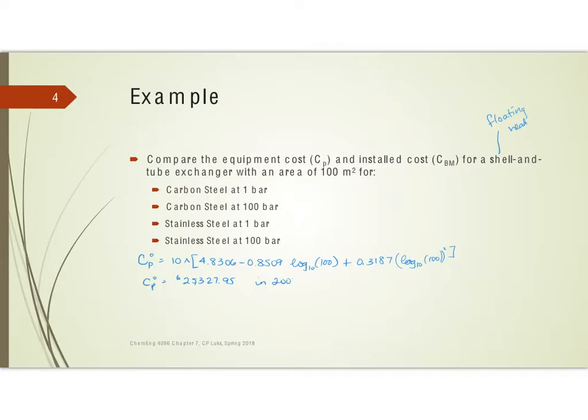Now, keep in mind, this is in 2001 dollars. So we can go ahead and adjust this to 2016 dollars. And then we don't have to worry about that again. So C sub P naught is 25,327.95. The CEPCI in 2001 was 394. And in 2016, it was 541.7. And so therefore in 2016 dollars, the price would be $34,822.71. So C sub P naught is the cost for the item of that size made out of carbon steel at one bar. So we do in fact have our first item done.